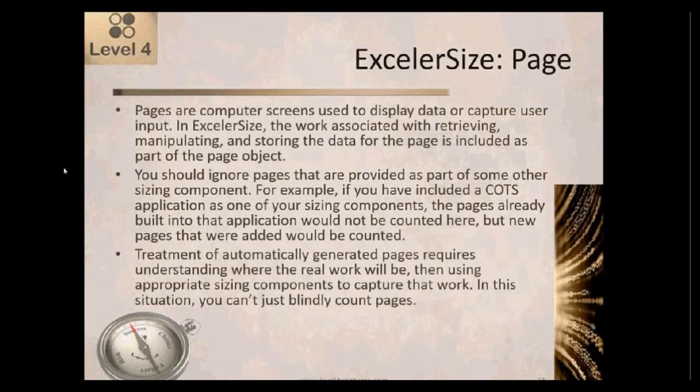Pages are computer screens that are used to display data or capture user input. In ExcelerSize, the work associated with retrieving, manipulating, and storing the data for the page is all included as part of the page object. So it's not just the design of the user interface page that we are including when we say we have 3 pages. We're including all of the back-end logic, all the back-end care and feeding of those pages to make them operational and functional. You should ignore pages that are provided as part of some other sizing component.